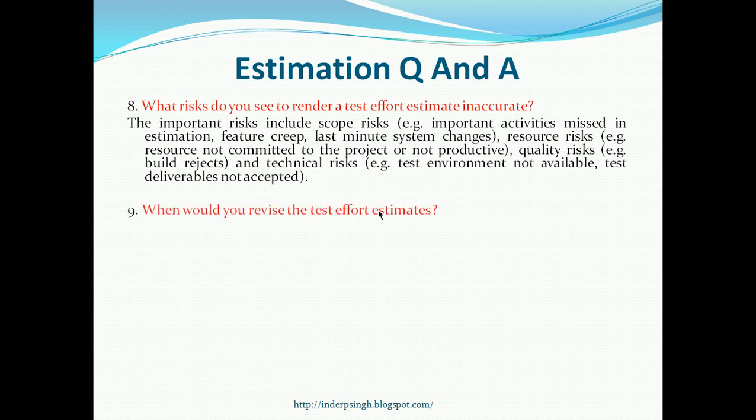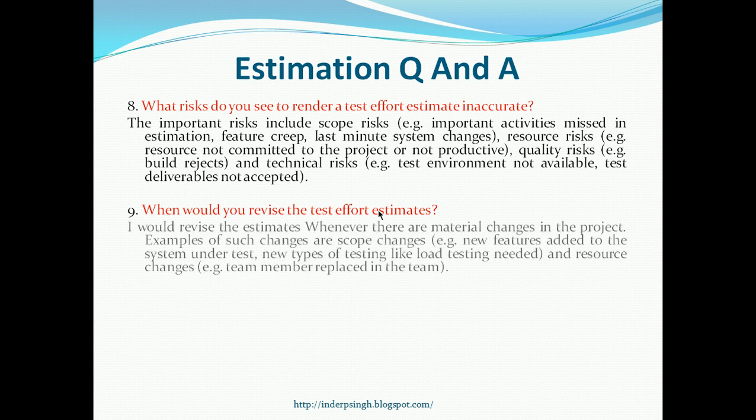The next question: when would you revise your test effort estimates? So that is whenever there are major changes in the project. So major changes are scope changes. Let us say a bunch of new features are added, so obviously your existing test effort estimates will no longer be accurate. You have to estimate against the new requirements. If there are new types of testing included, like load testing, or security testing, or privacy testing, then you have to again revise your test effort estimates, because you cannot absorb this extra work within your existing test effort estimates.